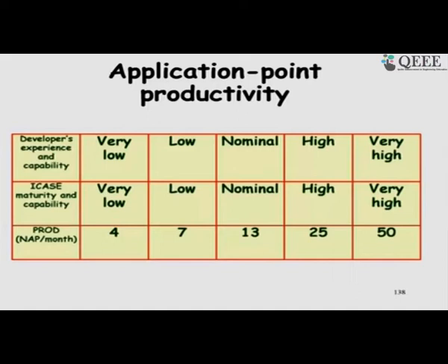So, here to come up with the rough estimate of the manpower requirement, cost and so on using the application composition model, we consider the maturity of the organization in terms of tool uses and experience and the capability and the productivity. So, if it is very low, then we are going to take large effort. So, these are the values given here. So, if we have very high experience and we have very sophisticated process and tool uses, so we take significantly low time.